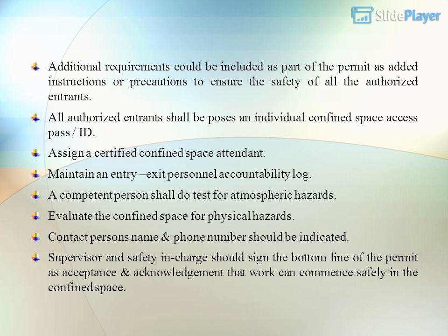Supervisor and safety in charge should sign the bottom line of the permit as acceptance and acknowledgement that work can commence safely in the confined space.